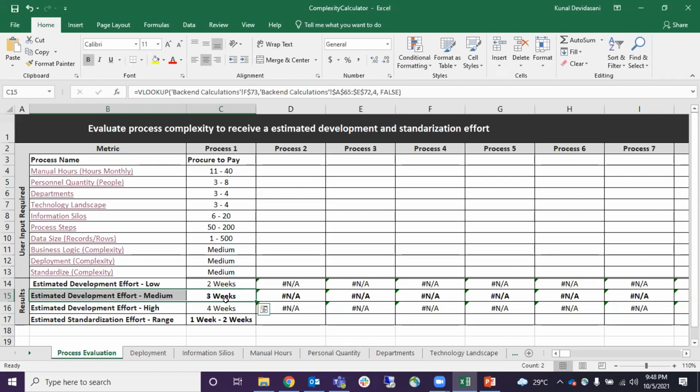Because that's the time when you identify if there are any bugs in the process, or if there are different scenarios which are coming up, which were not planned or which were not expected to be coming up. And that's the hypercare time which we consider. And then also the process documentation time for the PDD, SDD, that also varies basis the complexity. It can vary from 1 to 3 weeks basis how complex the process is.